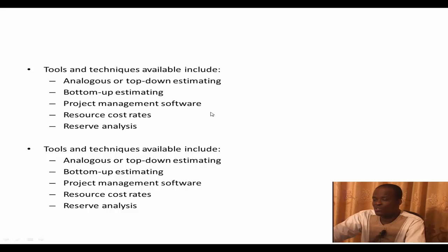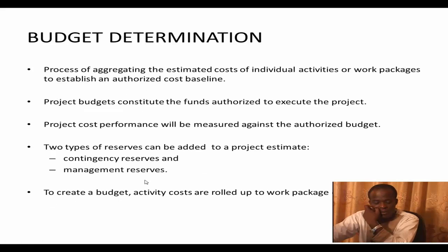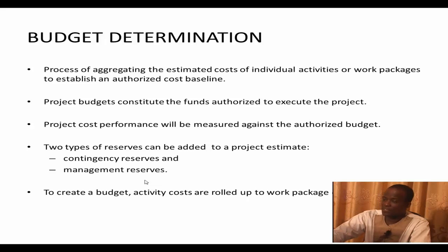Then we have the resource cost rates. Okay, all the resources that you intend using in your project environment will have cost rates, and these cost rates you could get, depending on your industry, from the industry or from within the organization. Okay, and these cost rates can aid you to know how much a particular resource costs. And then if you know the resource cost rates, you just multiply by the time it's going to take for the resource, and therefore that can help you get your cost for that particular resource within that time frame. And last but not least, we have the reserve analysis. So that's it for cost estimation.